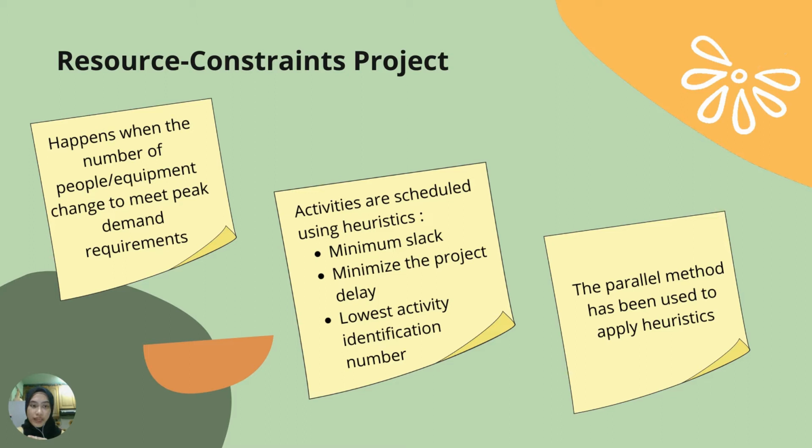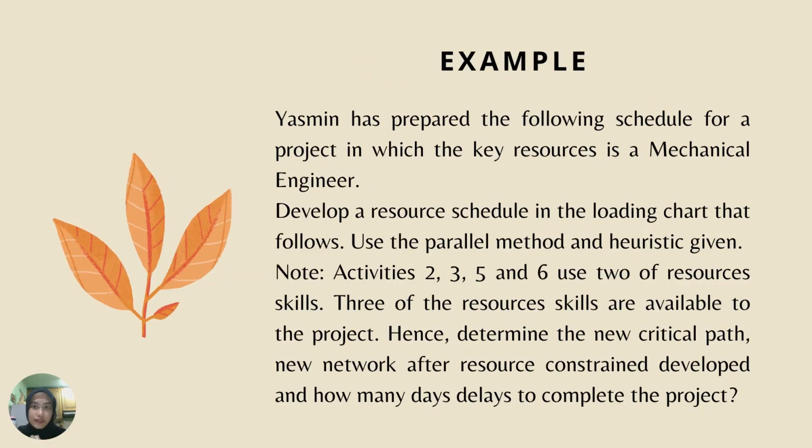The parallel method is an iterative process that starts from the beginning of the project, at the time where resource needs exceed the resources available. It sorts activities first by the priority rules.